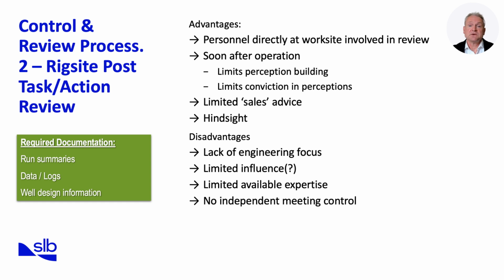The second type of review is the rig site post-task or action review. Unlike the daily review, this takes place immediately after a specific operation has been completed, while the details are still fresh in everyone's mind. One advantage is that only personnel directly involved in the operation are present, which limits the influence of external perception and allows for very specific hindsight analysis. Because this review occurs at the work site, it reduces the tendency for later story building or conviction in personal interpretations. It also minimizes outside sales influence, keeping the discussion closer to the facts.